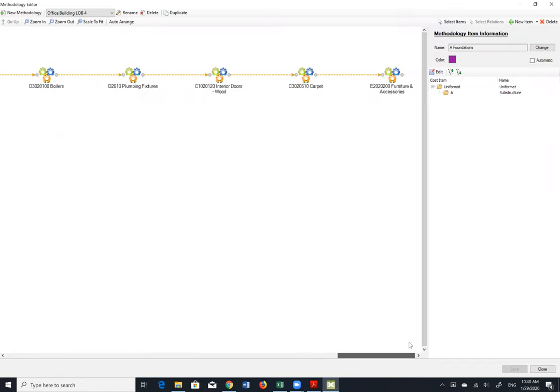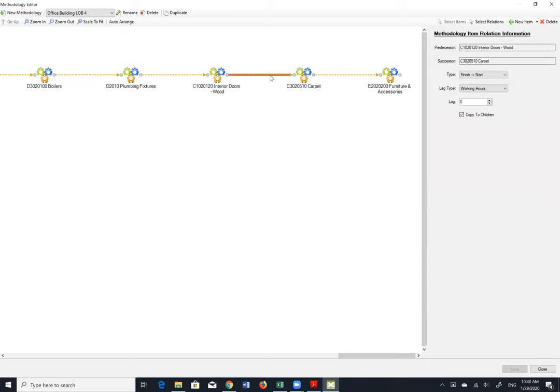And I'm going to just move to, let's say, carpet and furniture and accessories activities. Also, what is very important, you can define standard relationships among those tasks, like finish-start, finish-finish, and start-finish. You can define a lag in working hours or duration percentage. And what is very important for line of balance, you can, in an intelligent way, copy those relationships to the children tasks. And in this case, this is very important for creating an optimal line of balance and construction schedule.